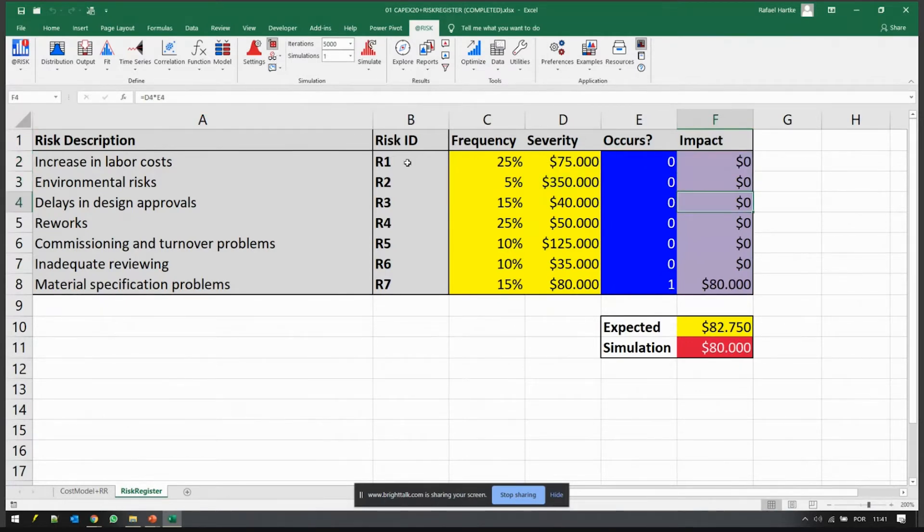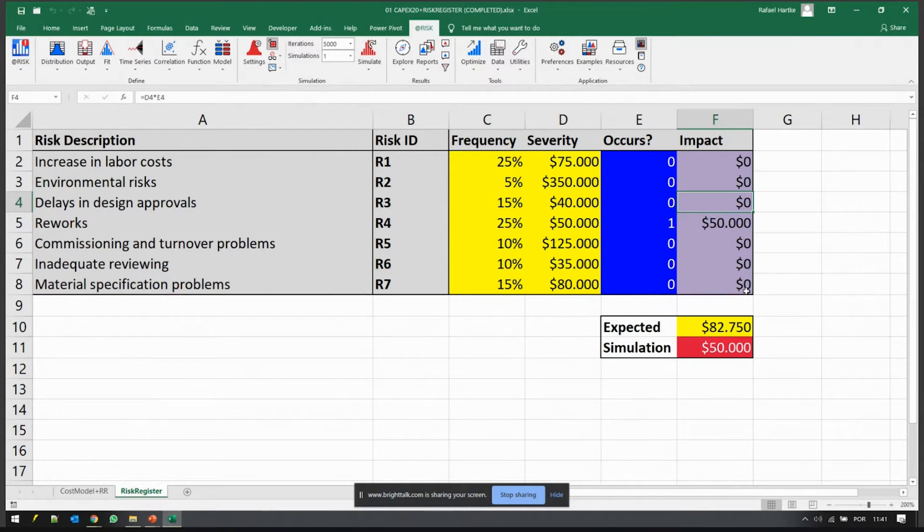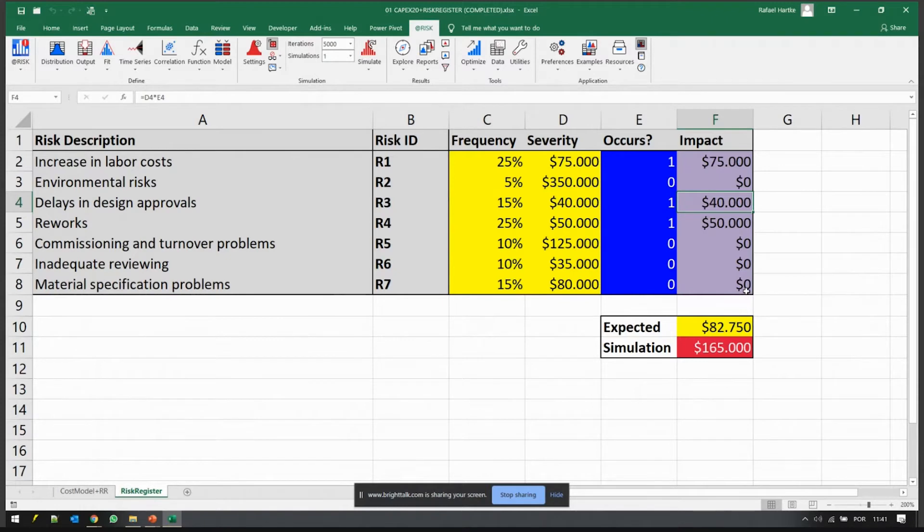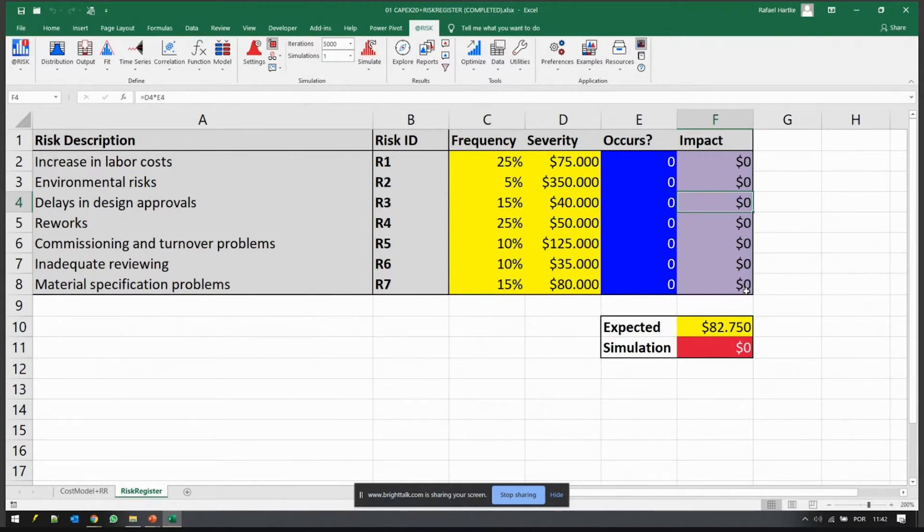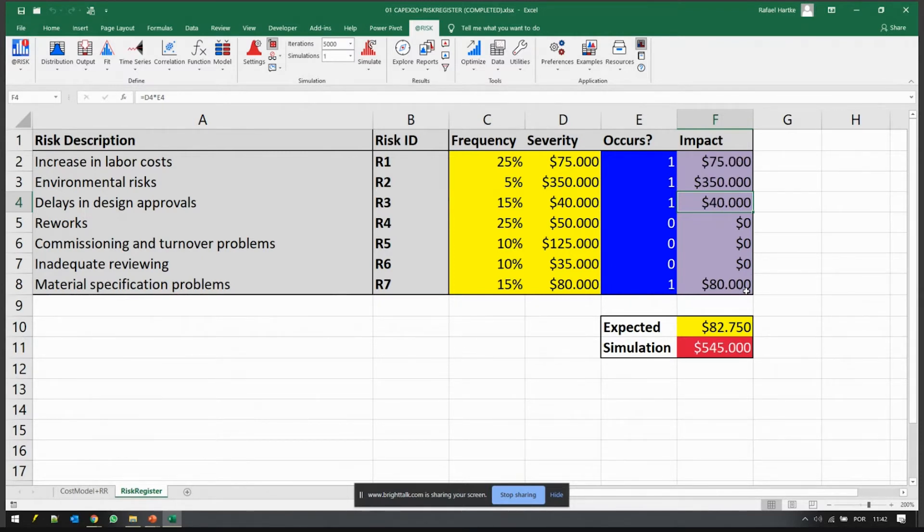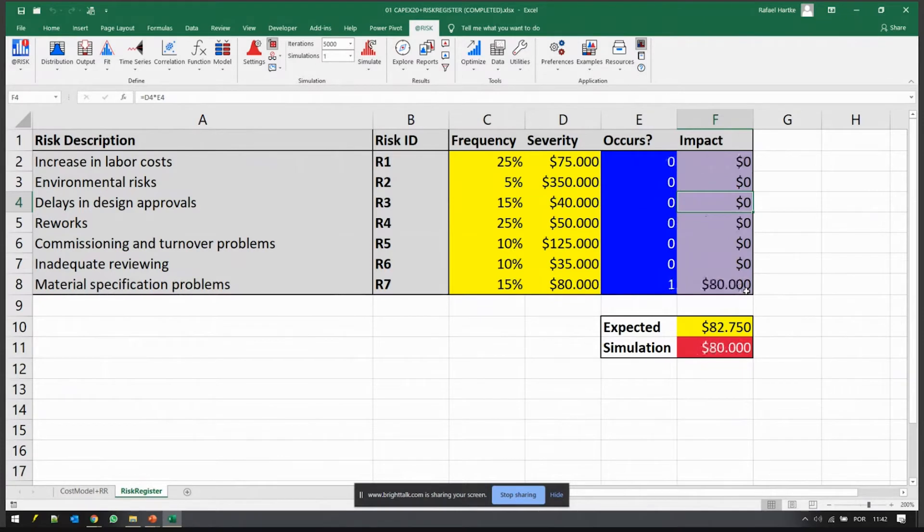You see situations where for example only one risk happened and then you had an $80,000 cost there, or another risk happened, or many of them happened. This is quite rare because the probabilities are small but it's possible. Or none of them, maybe none of them happened, or many of them, or one or two. So all these scenarios are equally possible.